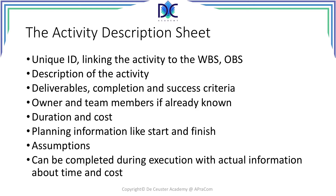The activity description sheet, also sometimes called a task description sheet, has the following information: its unique ID, which links the activity to the WBS and the OBS; a short description of the activity; and the deliverables, completion, and success criteria.